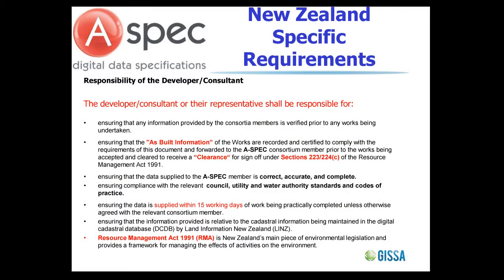It doesn't matter if it's a new council in the same area — we've got to make sure we cover the local terminology. We've built these New Zealand-specific requirements into every one of our specifications, because it's critical to tie in some enforcement to the receipt of data. You want clearance of your subdivision? Give us the data. No data, no clearance. You want to sign off on your capital works job? Give us the data. No data, no sign-off, no pay, no title. That's the big stick. In the 10 years I've been doing it, we've not had to use it once — but it's enough of an incentive.